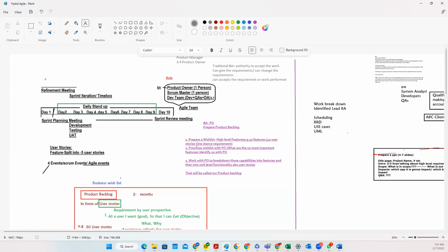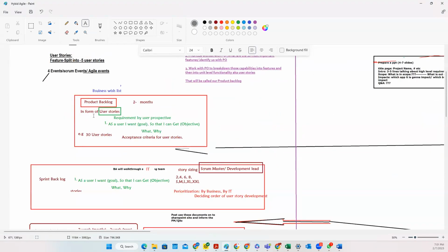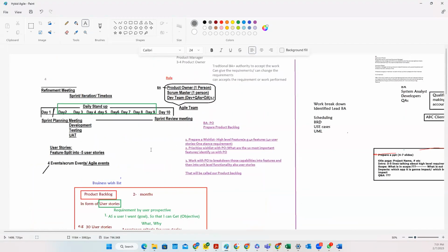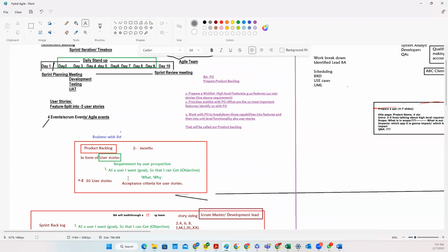First prepare that wish list. That is the list of user stories that will work as the first backlog draft. And then pick up user stories one by one and detail those user stories with the acceptance criteria, that is, what would be the acceptance criteria of that user story. And acceptance criteria basically are the points which verify the ask in the user stories are met.